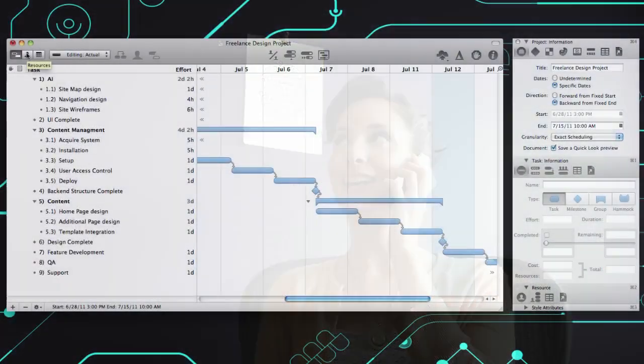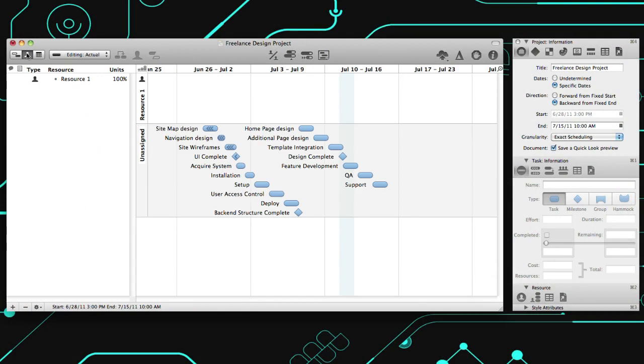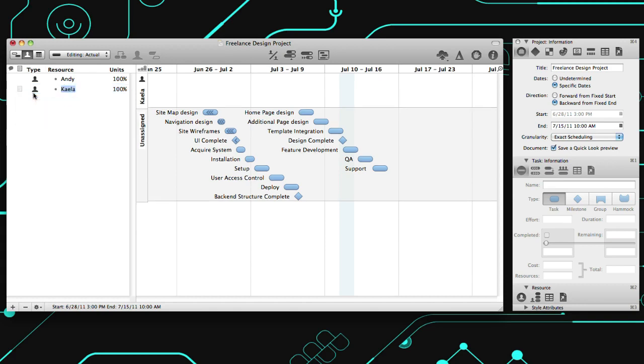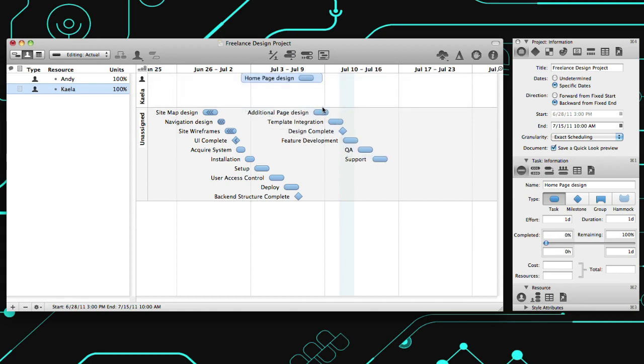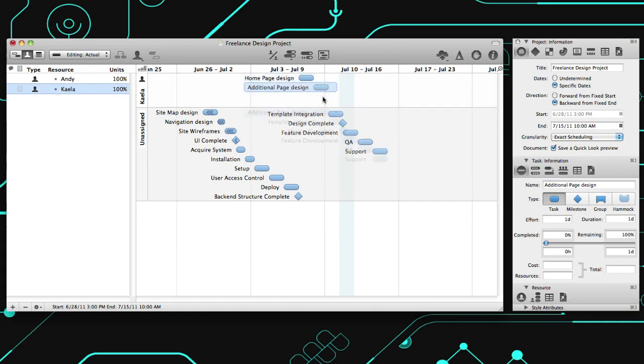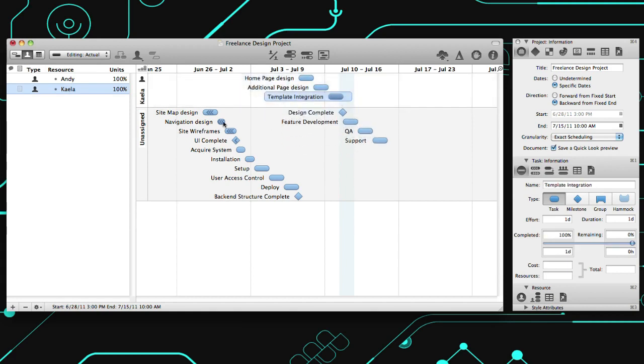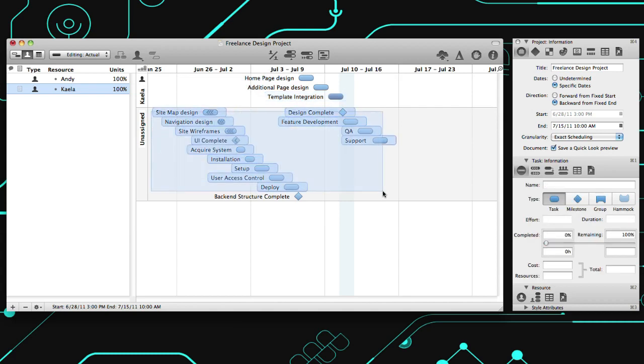Click here to add resources to your project. These are the people, equipment, or materials necessary to make the project happen and can help to keep track of cost and efficiency. Just drag tasks from unassigned to a specific resource, or select certain tasks and choose the resource from the Assignment button.